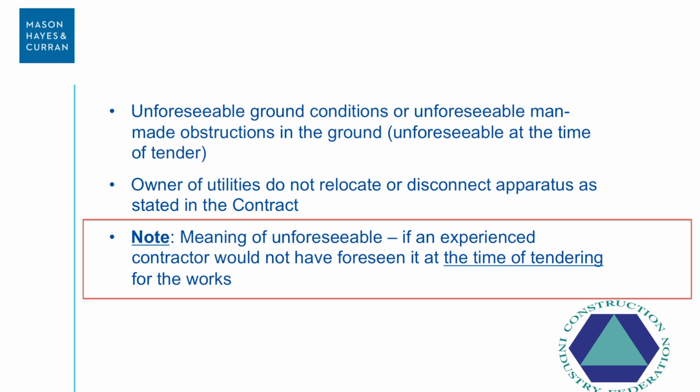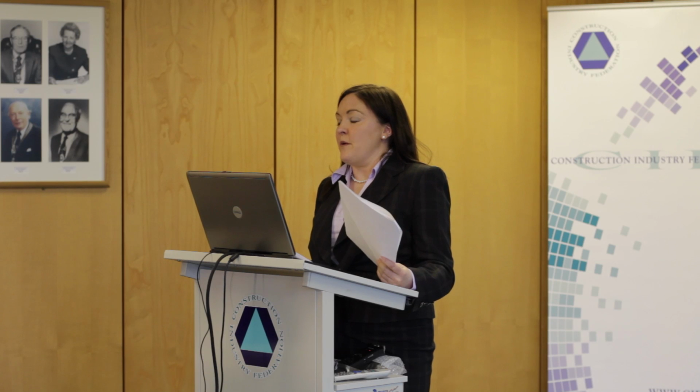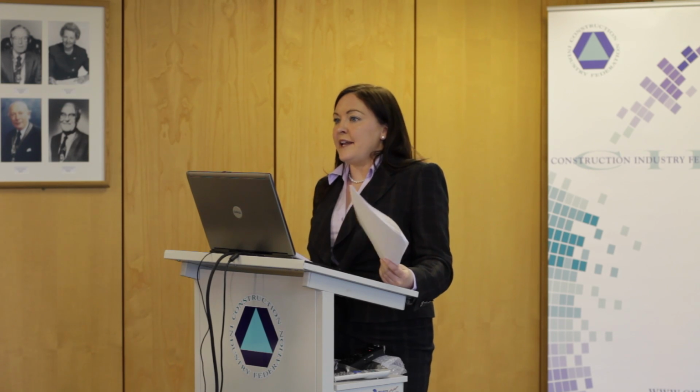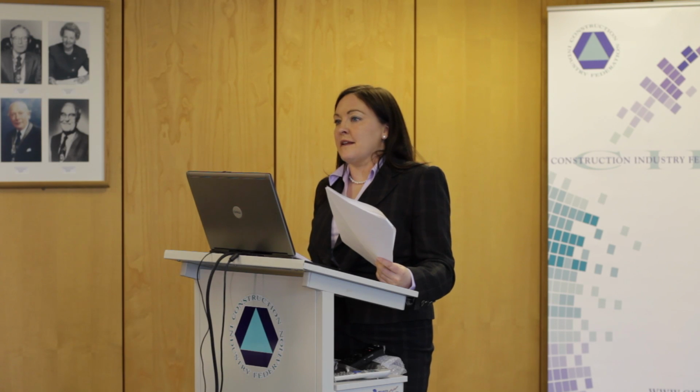Don't be shy about saying that something was unforeseeable. There's many things that were inconceivable, and you'll all have better examples than I will on this, right? But there's many things that when you actually tendered for the works, you didn't think there was going to be such and such pipes there or something. They weren't in the surveys, or then you open it up and they are there. That's unforeseeable. So don't be shy about saying that something's unforeseeable.